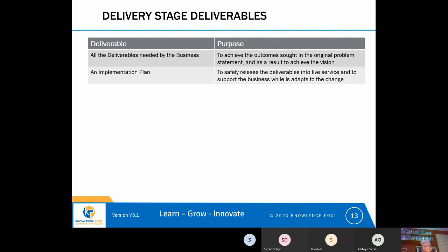The project can, having delivered all of the must-have requirements, take a decision to end, or it can take a decision while it has funding approved and time available to carry on gathering new requirements and making changes to implement those requirements with the business. That's down to the project's steering group and its sponsor to decide if it's using Agile.